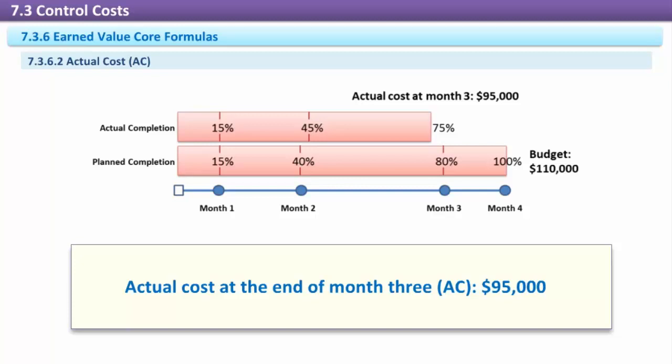For example, in an organization that is not projectized and that does not establish a general ledger for projects, the labor costs of internal personnel will not be directly charged to the project. The project manager will have to use some method, such as the time worked by these project team members, to create an actual cost that can be used for earned value measurements.